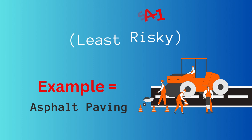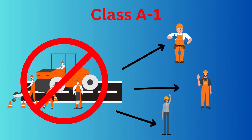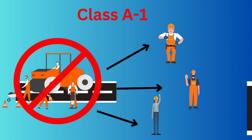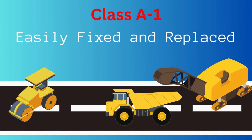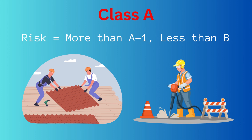Why is this type of work considered less risky? Consider that a performance bond guarantees the completion of work under a contract. Under normal circumstances, if an asphalt paving contractor cannot perform, a bond company could likely find another contractor to complete the contract for a similar price. Additionally, if work needs to be corrected, it can usually be milled up and replaced easily.